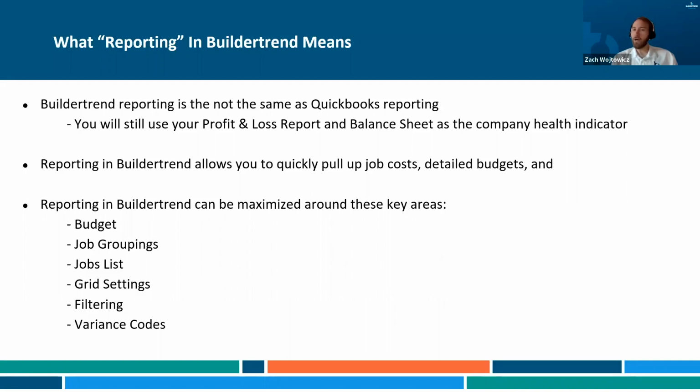Well, now it does a calculation where it says, hey, on this particular item, you estimated that it was going to be $1,000. It came in at $1,100 and you flagged $100 of it as a variance. That'll tell you, hey, that was a 10% overage on that bill. Then you can lay that across all your projects.